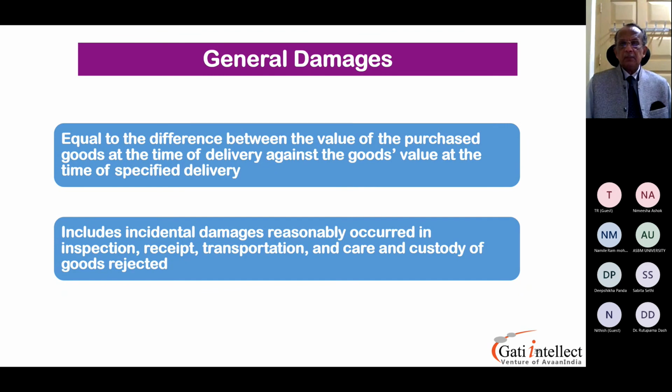Now the supplier is obliged to give you the technology that is applicable at the time of delivery. That is the norm. And the supplier has every right to go back to the buyer and say, yes, the technology you are going to get is the current one, and there is going to be a price difference for that. He's got every right to ask for that.